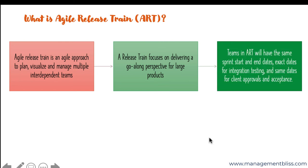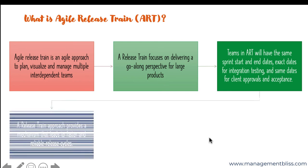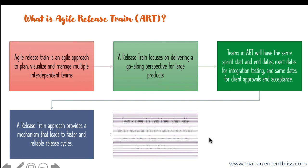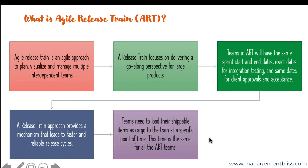The Agile Release Train approach provides a mechanism that leads to faster and reliable release cycles. In Agile Release Train methodologies, teams need to load their shippable items as cargoes to the train at a specific point of time. This time remains the same for all the ART teams.